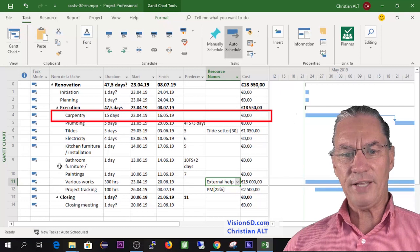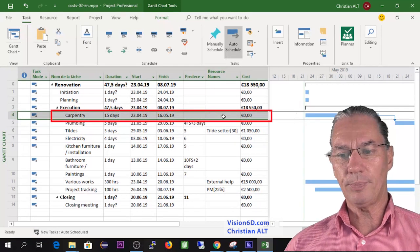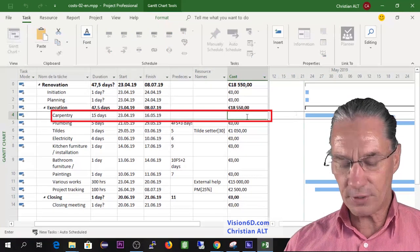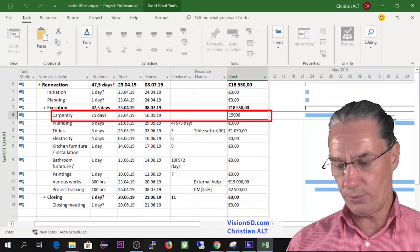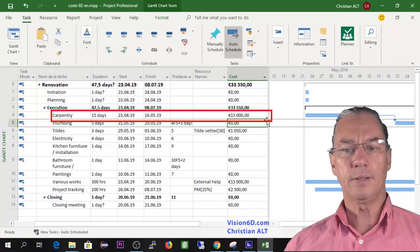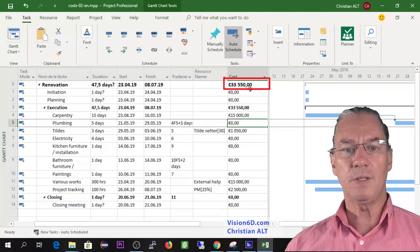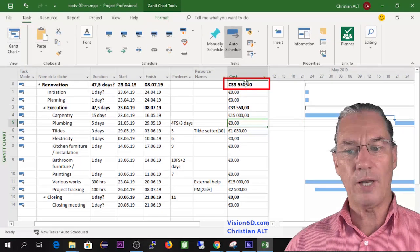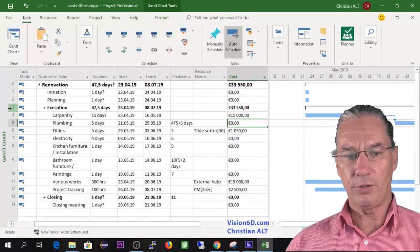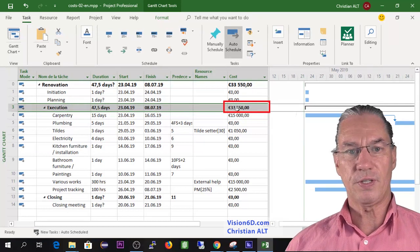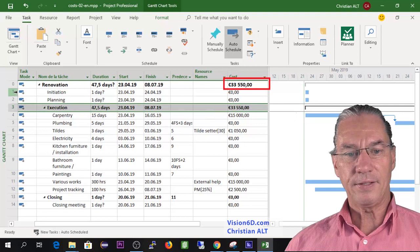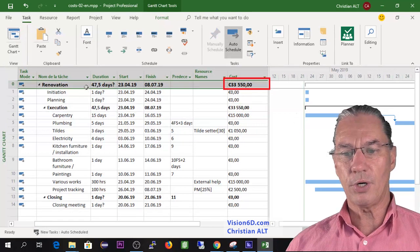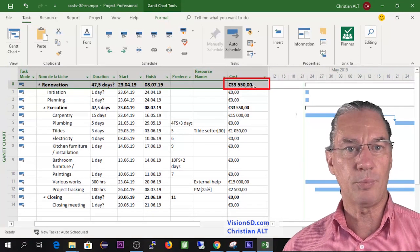From then on I will jump here up to the carpentry. The carpentry work, I could simply say since it's a cost resource it's 15,000 and just put it that way into MS Project. You see that MS Project is doing the calculation by itself. We have here on the summary task for execution, the current cost is 33,550 euros, and at the level of the complete project since we don't have any other costs, there is the same amount.